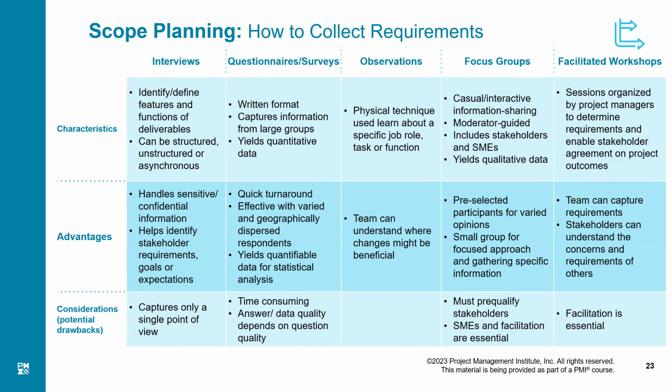So it is easy to handle. But disadvantages were, what did I say? Groupthink is the biggest disadvantage. Out of this group, some people may be more impressive due to their seniority, due to their position, due to their knowledge. And once that person has spoken, others are gone. They don't want to give their opinion. They tend to agree with the opinion of the more influential person. That is a group thing, which we somehow have to counter in this case of focus group.